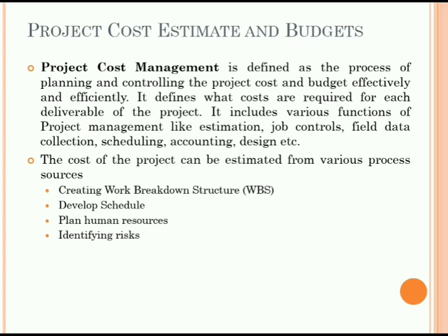In a smaller organization, a project manager might speak informally with a potential resource, let's say a copywriter, and say, how does your work look next week? Okay, we got a request for 8 to 10 hours of copywriting and editing for 4 web pages. The writer could say whether he or she had time available, then the project manager would have to get formal approval from the manager, who marks the resourcing in the company's tracker.